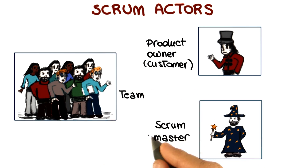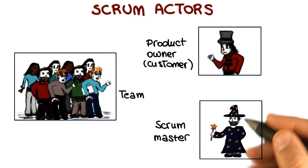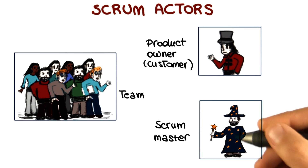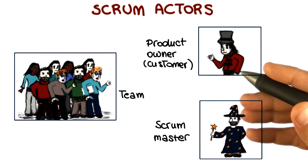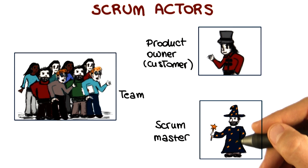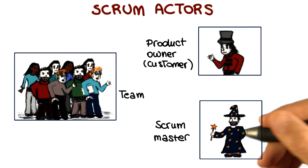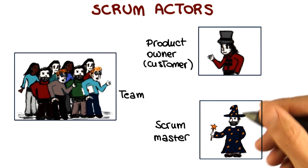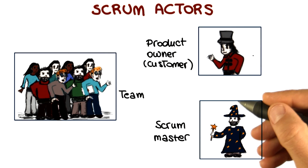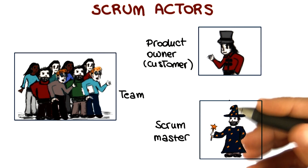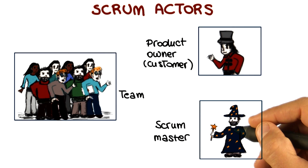Finally, we have the Scrum Master. The Scrum Master is the person who is responsible for the overall Scrum process. He or she has to remove obstacles, facilitate events, and help with communications. You can see the Scrum Master as sort of the manager, or the person who has oversight, the supervisor of the Scrum process.